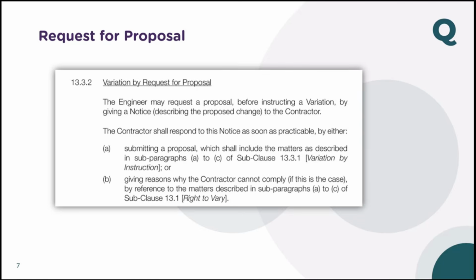In the second case, he is not sending the instruction. Let us take the same example. The client wants to install or construct an MSC board, but he doesn't want to send a direct EI. His mind was, you will take a proposal from the contractor and see how much it is costing. If that is okay within the budget, we can go for it. If not, no for that.